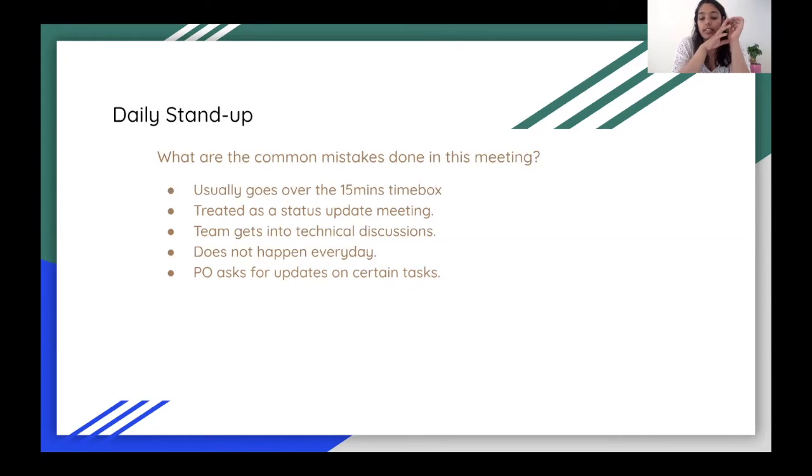But there are exceptions. Now if there is a bug or if there is a problem that is time bound, like something has gone down and it needs to be fixed immediately, and there is pressure, there are monetary impacts of it, etc., yes, of course you can then ask questions. I would still suggest you just at the end of the daily say, hey guys, can you all stick back, I need to understand what is happening with this ticket. But avoid asking these questions in the daily, and avoid asking questions about tasks that are not time bound.